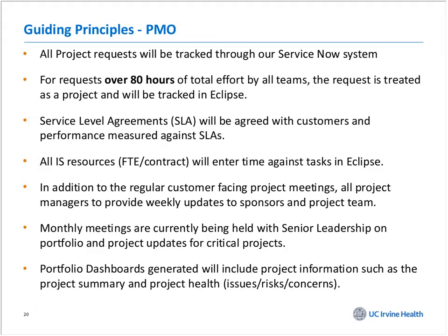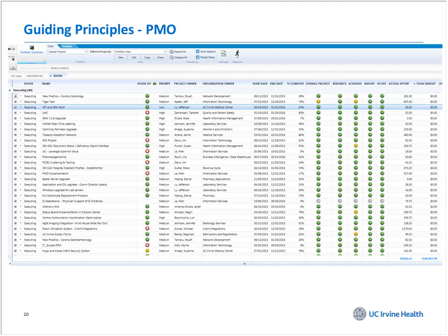We do project-based meetings, customer-facing meetings, and monthly meetings occur with senior leadership. We create dashboards on the project, with tracked issues, risk concerns, things like that. That's all done via the PMO, and these are done for every single project. These are the guiding principles for everything that we do.